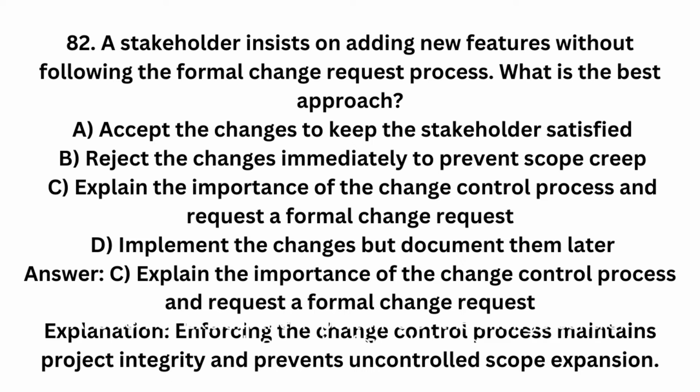Answer: C. Explain the importance of the change control process and request a formal change request. Explanation: enforcing the change control process maintains project integrity and prevents uncontrolled scope expansion.